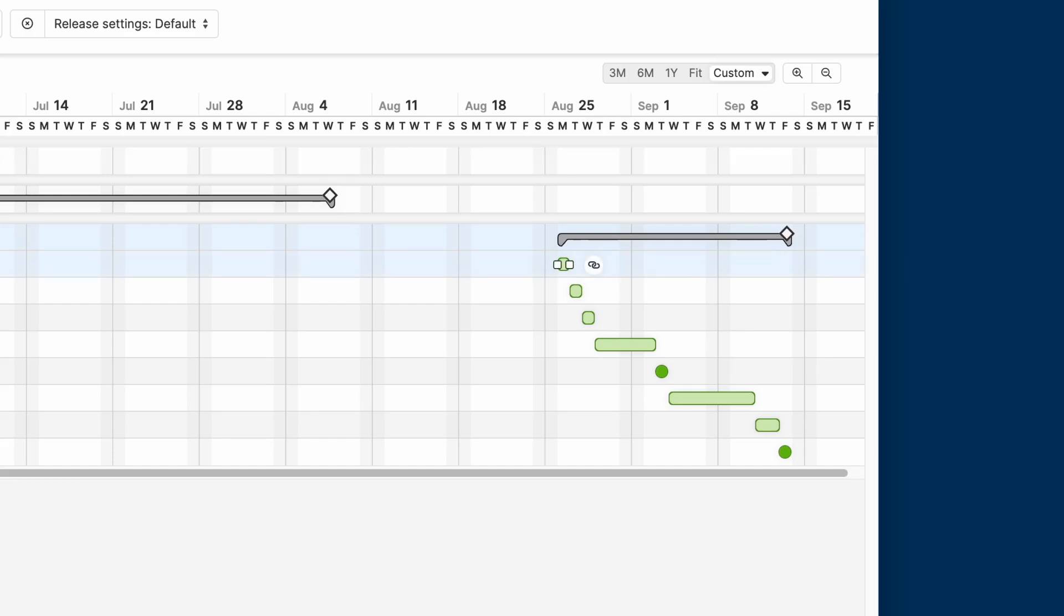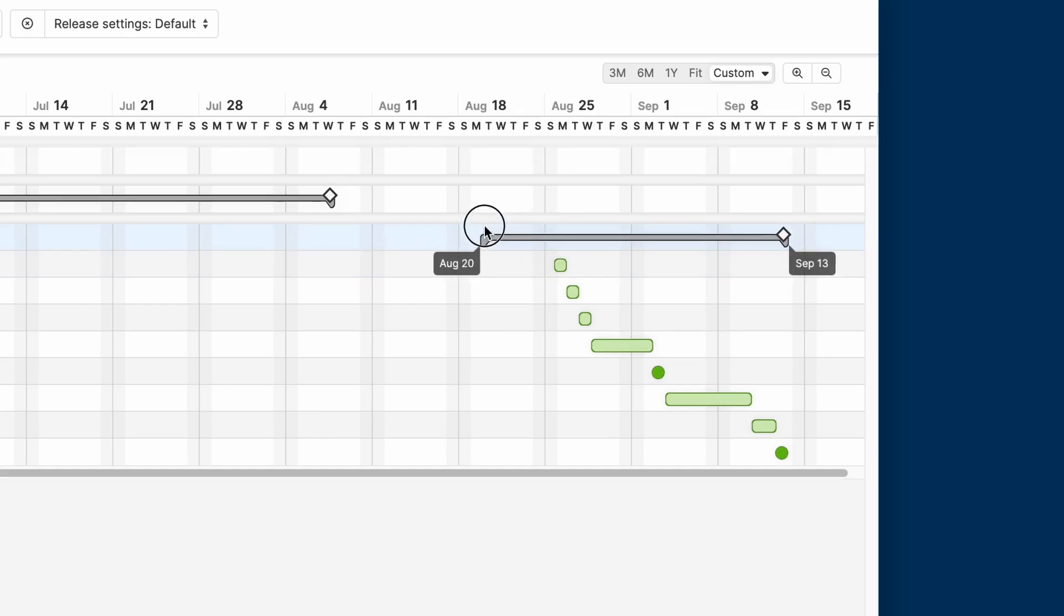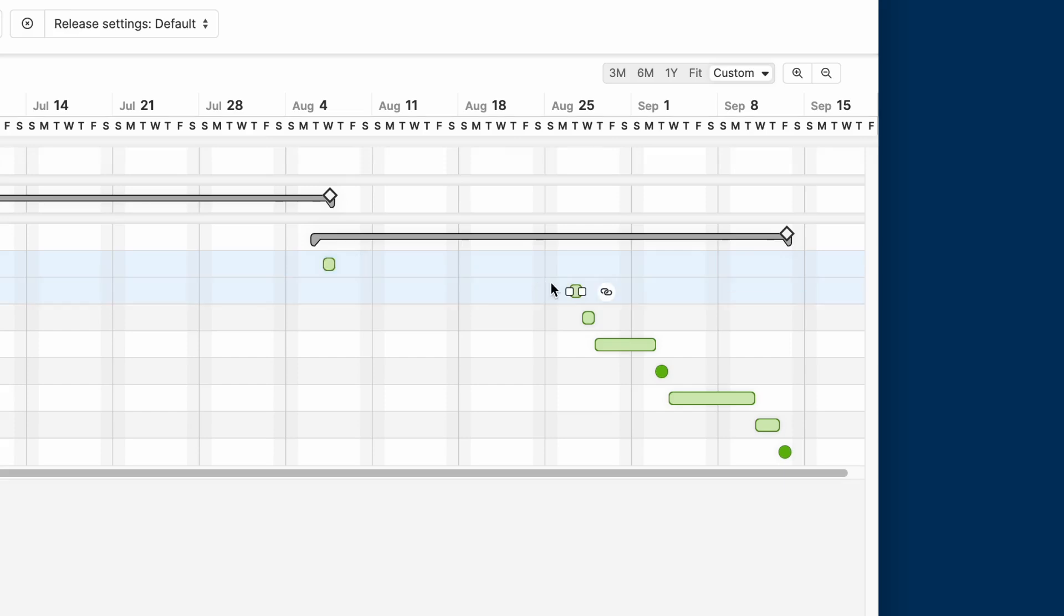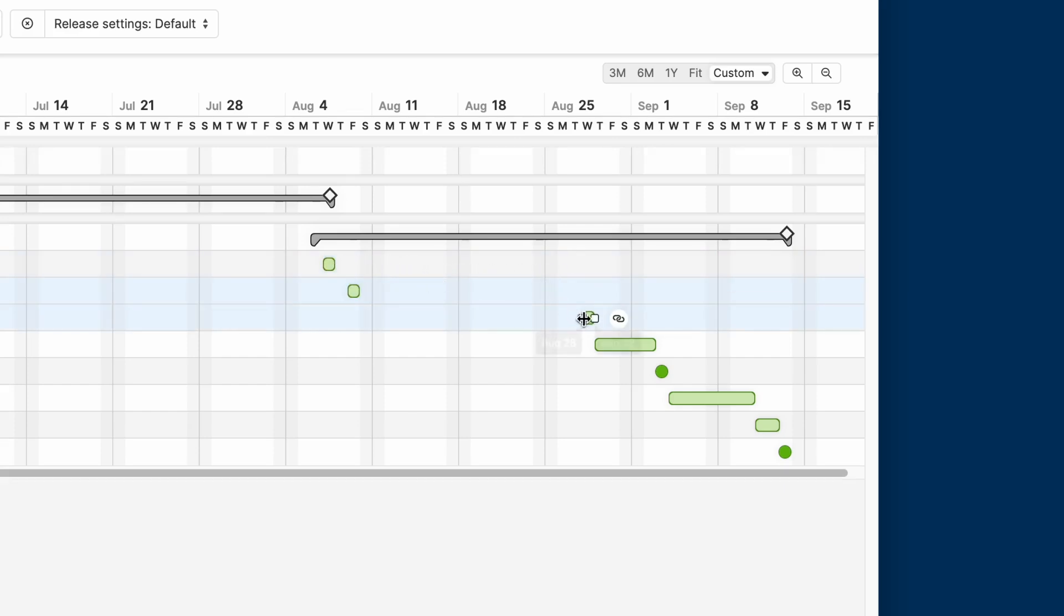You can reschedule work right from the Gantt. For example, we want to move the start date of this release to happen right before the end of the release above. You can do the same for phases and milestones. Simply drag them across your timeline to reschedule the work.